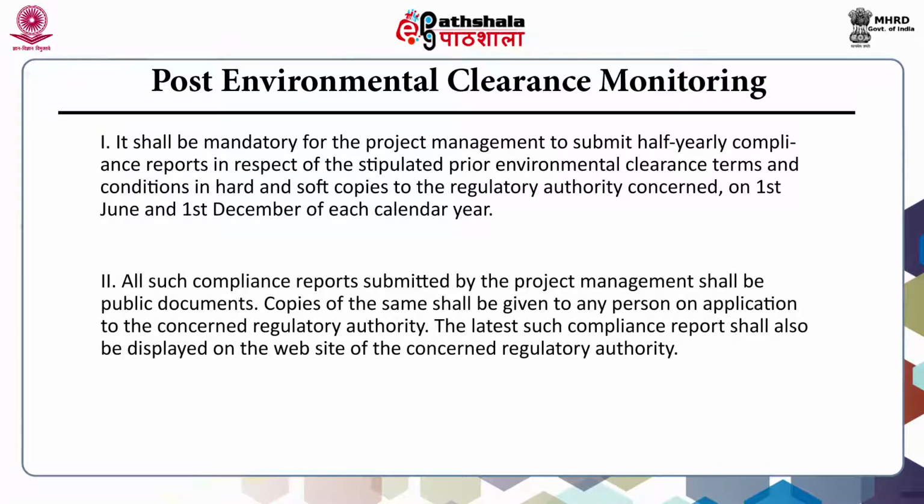All such compliance reports submitted by the project management shall be public documents. Copies of the same shall be given to any person on application to the concerned regulatory authority. The latest such compliance report shall also be displayed on the website of the concerned regulatory authority.